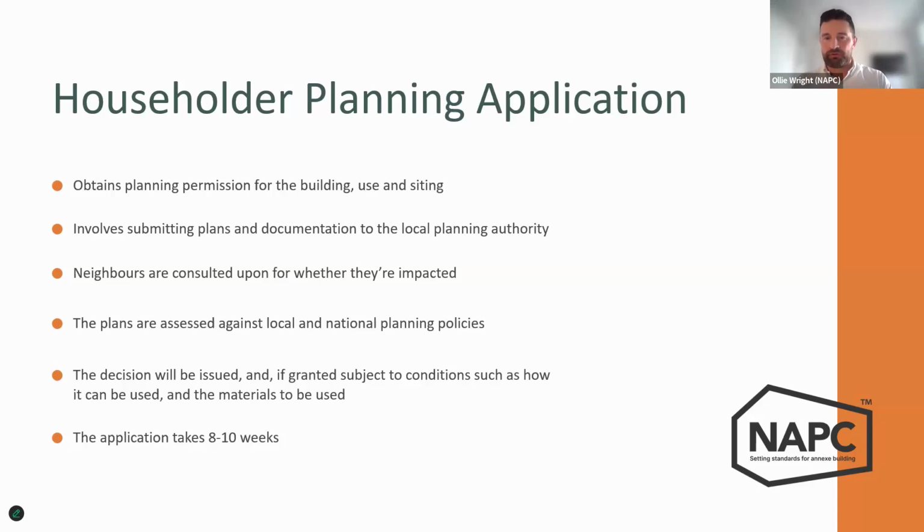And then once that decision is granted, which is hopefully the case, it'll be subject to a number of conditions. Now, there's usually three main ones. The first one is you have to start the project within 3 years. So you don't have to finish it. You just have to commence the build within 3 years. The second one is you have to build it in accordance with the plans that we've submitted and got approved, which is sort of common sense.